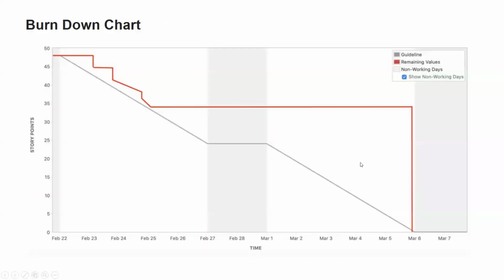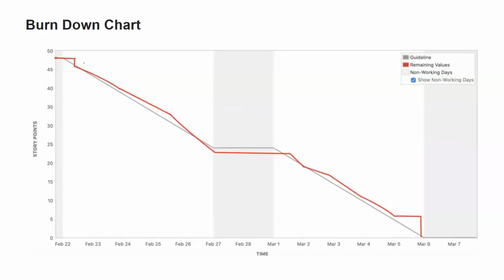So always try to enter time on a daily basis. Why? Because if we have a graph like this with this red line, anyone who is looking into this project can get an understanding of the status, and if there is anything to be done, anything needed to control this project, right? Monitoring and controlling.